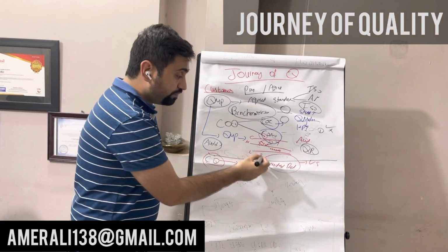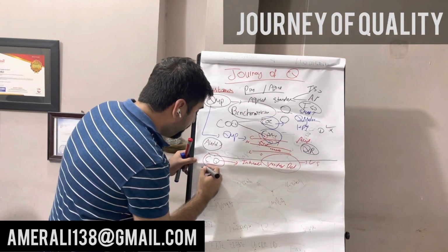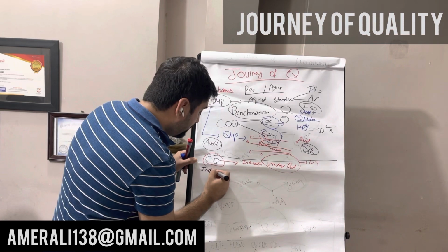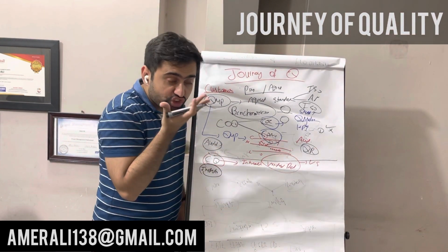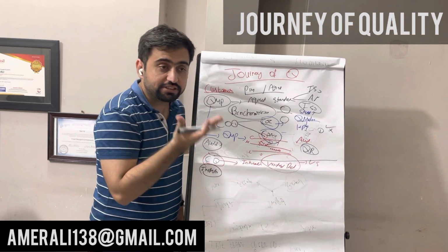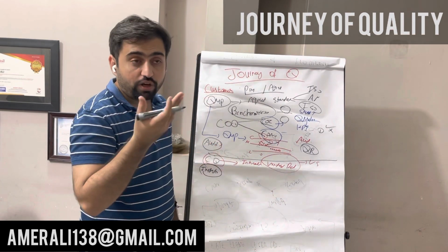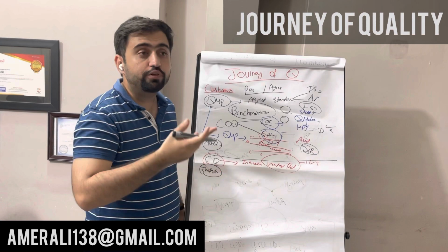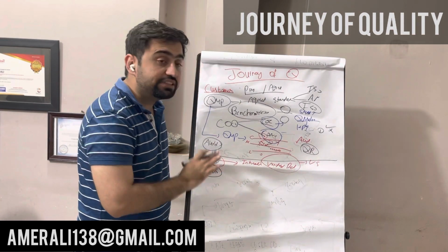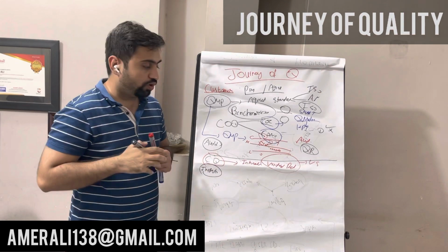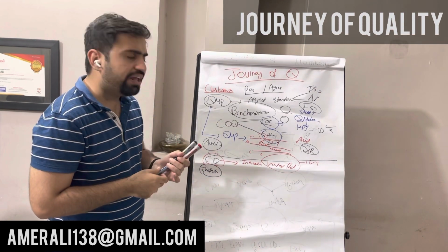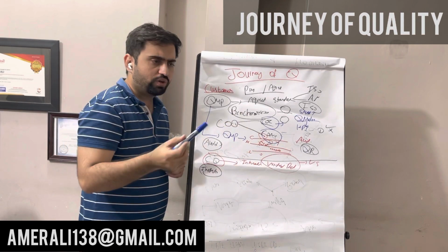Okay, so the major tool that you use here is inspection. The quality team is inspecting the deliverable, checking whether this deliverable meets the client's quality or not. You can have peer reviews and walkthroughs to check these deliverables. But the biggest thing is inspection here. Okay, so you are using many tools in order to check the process.